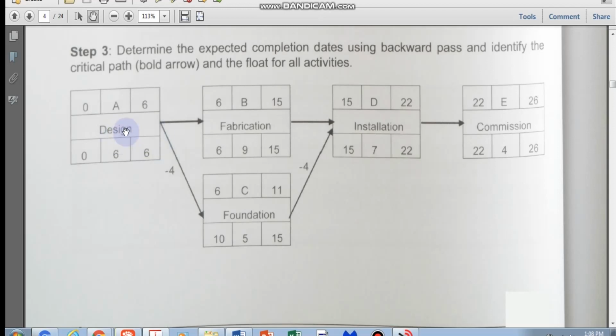So here you put 0, meaning there's no room to delay A at all without delaying the subsequent activity. And here you've got room. You can delay the foundation for 4 days before the next activity will be affected. So this is the idea of free float. This is the time available that you can use without delaying the subsequent activity, and you're asking, why do I want to bother with that?